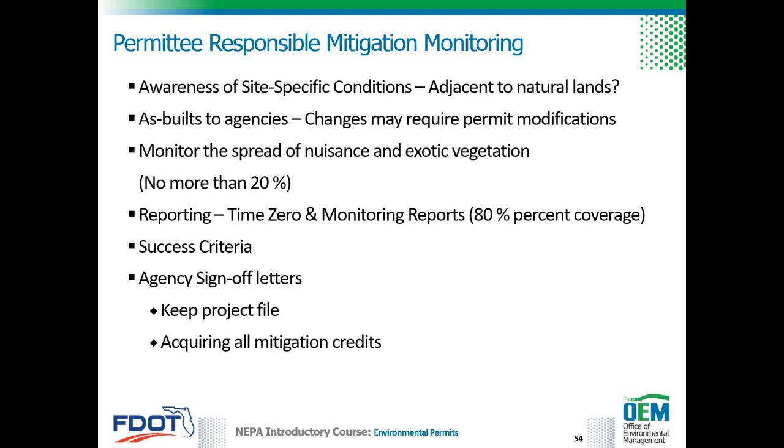Monitoring activities would include reporting to the agencies on the agreed-upon success criteria, including monitoring the spread of nuisance and exotic vegetation and survival of desirable species. The first report is termed the Time Zero Report and forms the basis of all future monitoring.